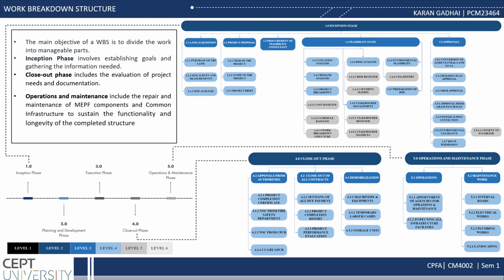The work breakdown structure is a hierarchical decomposition of project deliverables into smaller tasks and tasks into more manageable activity levels. The significant advantage of WBS is that it provides a clear picture of the project in detail. It helps in making schedules and estimates and identifying smaller work packages that can be assigned to groups so that the whole project can be controlled and monitored in detail.